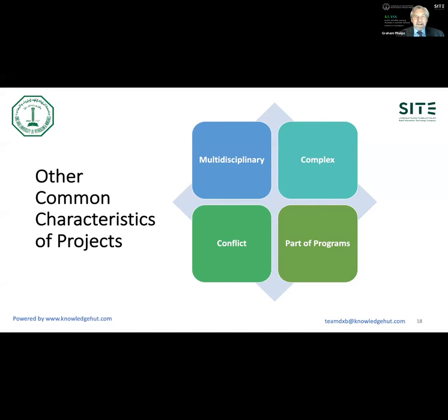If you were refitting a factory or a warehouse facility, the specialists involved, be they architects, builders, electricians, designers, will not, in many cases, be working exclusively on your project for the whole of the time the project's running. So you will need to commit their time when you need it. So it's part of a program of projects. It also means as a manager, you may have several projects running at the same time, which also means a great demand on your time.